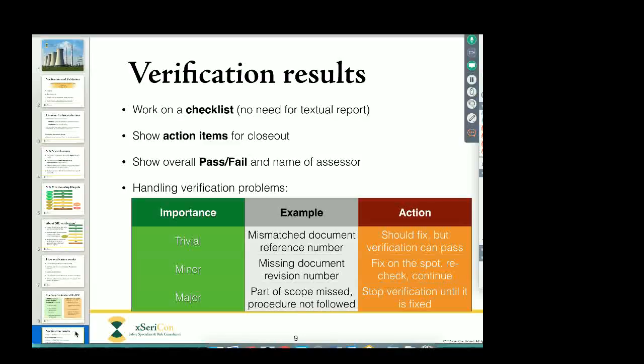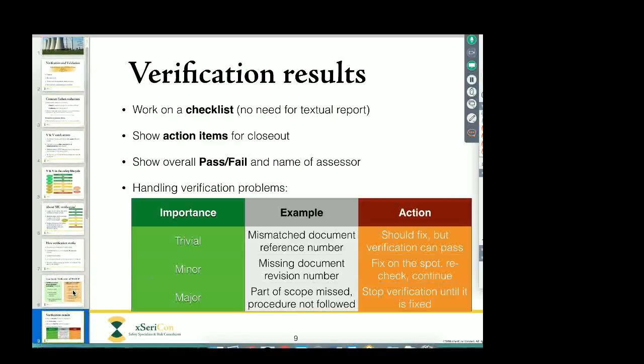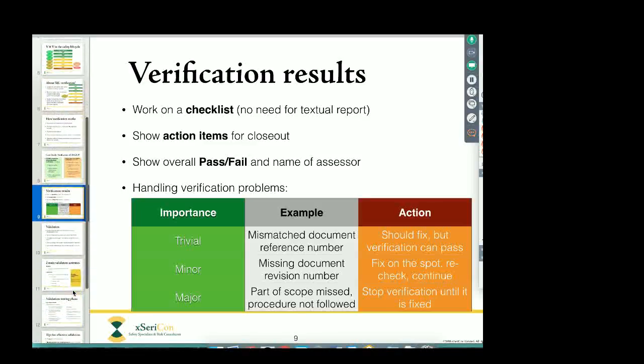So I'm suggesting we categorize the level of seriousness of the issues that we find. And so we should have some kind of categories defined, and I would think that categorization belongs in the functional safety management plan. You may be familiar with a concept like that if you have done validation before, because you need a similar kind of thing for validation.